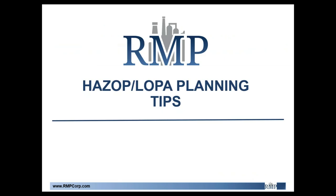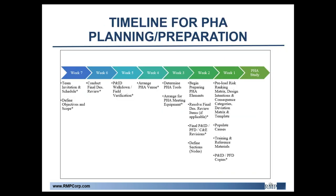Moving on to some HAZOP planning tips. I have a nice timeline for you. During week seven, the most important thing is to invite every team member and start scheduling things appropriately. If you don't get on these busy people early on, you're not going to get those key players that you really need in these important sessions. You also need to define objectives and scope early on so you have a well-laid-out timeline and are properly prepared.